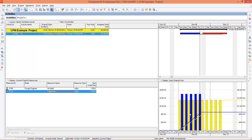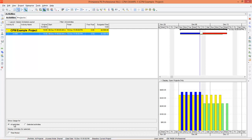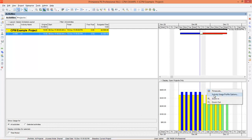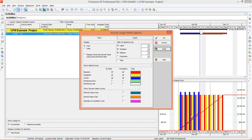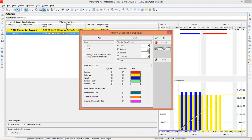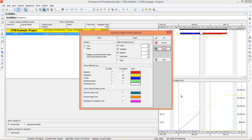Similarly, you can generate an S-curve another way using the Activity Usage Profile. Go to this option and you can see all activities. Right-click on the graph and go to Activity Usage Profile Options. Select Cost, Baseline by Date and Cumulative, Budgeted by Date and Cumulative, Actual by Date and Cumulative, and uncheck Remaining Early. You can also check labels and Non-Labor Material here. Press Apply — the program has generated a curve. Baseline and Budgeted are the same so you can remove Baseline. Now you can see the S-curve is generated. If you don't want to show the bars you can uncheck the bars to display only the curves.